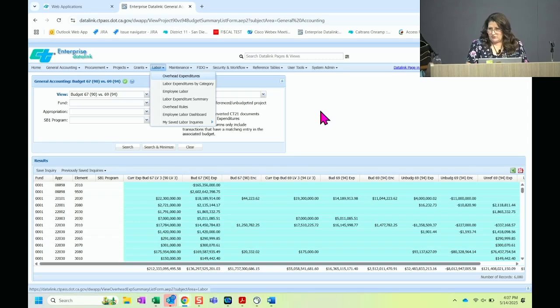Yeah, so they probably need to maybe work with accounting to see if they can change the fund to the ultimate fund, to the true fund, because if it's hitting 0048, it's hitting the TRA account in accounting, and it's not hitting the true ultimate fund, which is the project budget fund. So maybe we can work with Lenka in accounting. She's really good with encumbrances, and maybe they just have to do a correction to the CT document, the contract itself, where they fix it. I don't remember. It's been so long since I researched it.